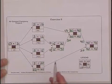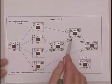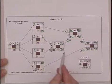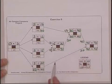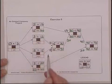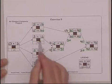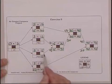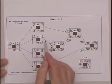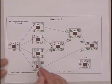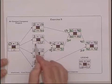We look up at B. The latest finish for B without delaying G is 30. 15 minus 30 is 15. Then these two activities off the merge activity, it's both 15 and 15. You got to follow the arrows backwards. 13 minus 15 is 2. 10 minus 15 is 5.